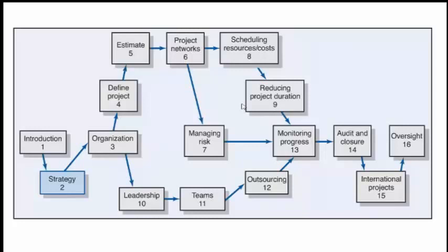So you should have your top risks, you should have a mitigation plan. Once the risk occurs, what is the plan? How do you mitigate the impact of the risk? How do you reduce the impact? For example, in a project, if some resources resign or leave, you may have a backup resource who can come in immediately and take up the work, so that the impact of somebody leaving the project is reduced.